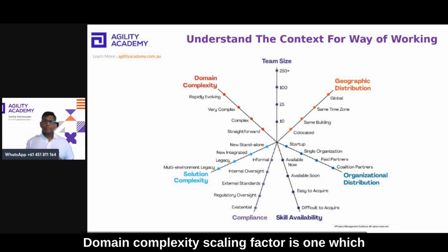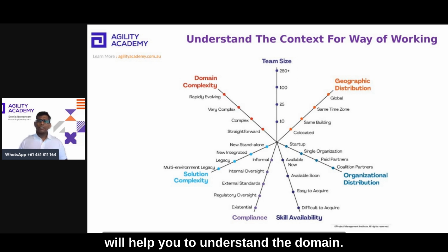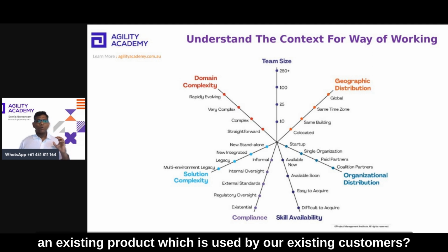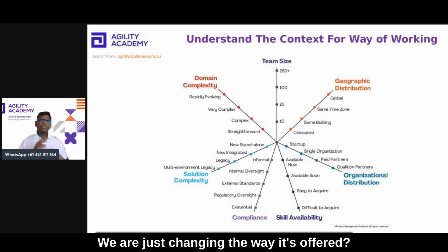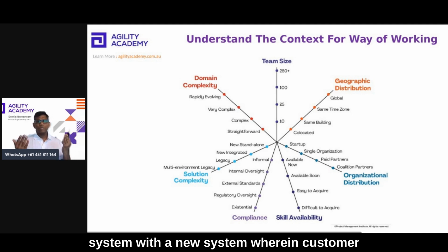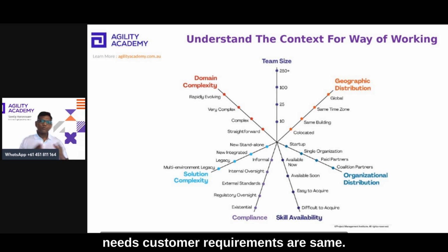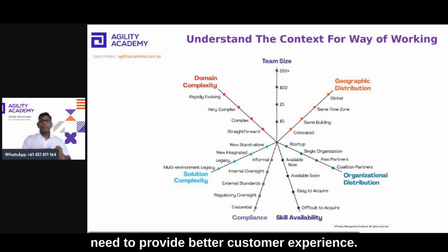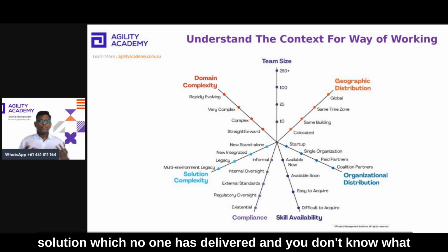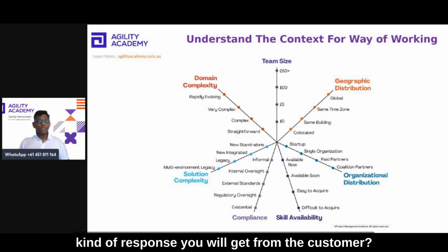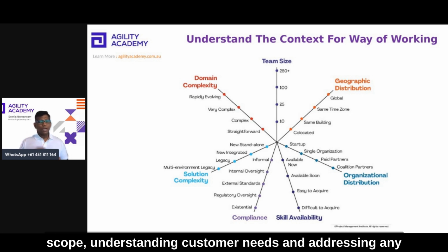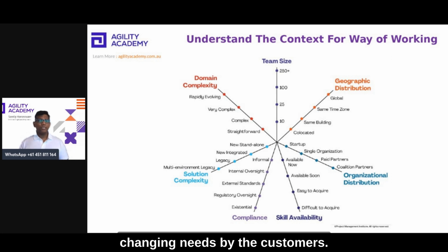The domain complexity scaling factor is one which will help you to understand the domain. Are you working in a domain where there is an existing product which is used by existing customers, and we are just changing the way it's offered? Or are we talking about replacing an existing system with a new system where customer needs and requirements are the same, and the only difference is that we need to provide a better customer experience? Or are you talking about coming up with a product or solution which no one has delivered, and you don't know what kind of response you will get from the customer? This domain complexity plays a crucial role when it comes to exploring scope, understanding customer needs, and addressing any changing needs of the customers.